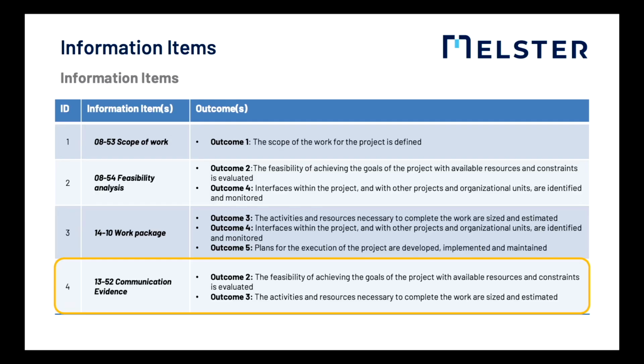Something similar is true for the estimation of the activities. They shall be estimated by the people who will perform the activities. So these things, the feasibility analysis, the activities, the estimates, are communicated back and forth between the different groups in the project and outside the project during the creation of the feasibility analysis.